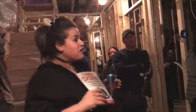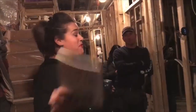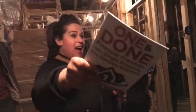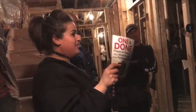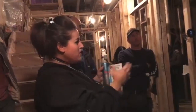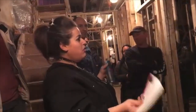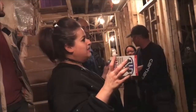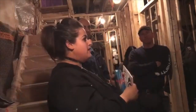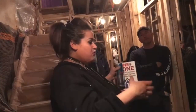But you do that actually. I do. So I go above and beyond, and most underpinners don't do this, but I make friends with your neighbors before you do. And I get them to sign a party wall agreement on my behalf, and then I provide it to people like Adam to send to the city and get us a permit. So that's your first stage. Then the process itself, once we receive the permit from Adam, who works out all the underpinning stages, which are all documented on the permit plans and then stamped by a structural engineer. Once that's in my hands, I'll schedule the project.